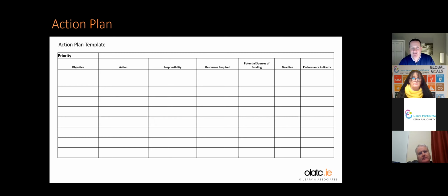So we often look at, say, building projects, and you'll see on their actions that they're going for procurement for builders to get quotations before their planning permission. So you're like, well, the planning permission has to come first, but before planning permission, you need a set of drawings. Who's going to do a set of drawings? So you just basically allocate or reprioritize the various actions based on a common sense approach to it, because you have to do certain steps to get to the next steps.